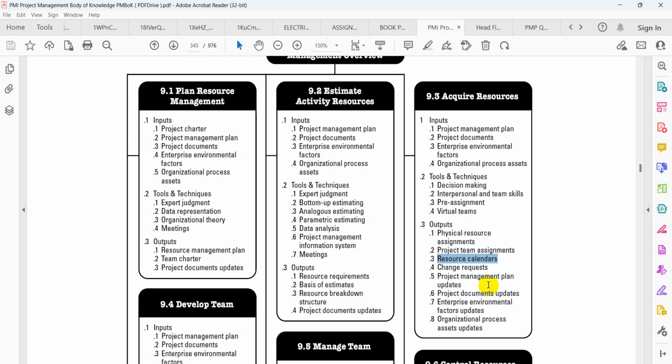Let's say, for example, you will require a code reading machine for doing something. So on that date, when you reach that area, you hire it, so that you don't waste money and hire it before the time comes. Correct. And also people that you will require on site, you don't have to allocate them on site before time. They must do the job when available, so you need to wait for the exact time, because they have got other duties.